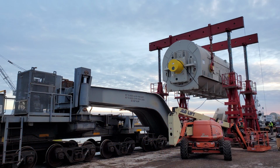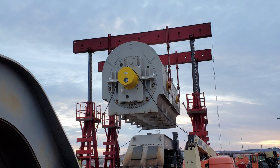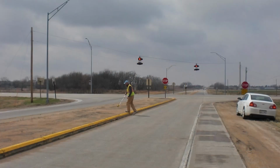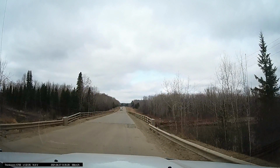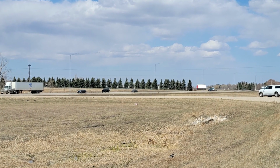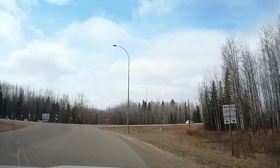Shortly after this initial contact, the Canadian rail owner canceled all pre-approved rail clearances from Duluth to Edson due to weight restrictions on the Canadian rail system. Upon this cancellation, the client contacted Barnhart as well as a local Canadian heavy hauler and rigger to perform 2 independent feed studies to determine over-the-road transport feasibility from Sweetgrass, Montana to Edson, Alberta. These feed studies included a route survey from Sweetgrass, Montana to the project site as well as preliminary permit submittals.